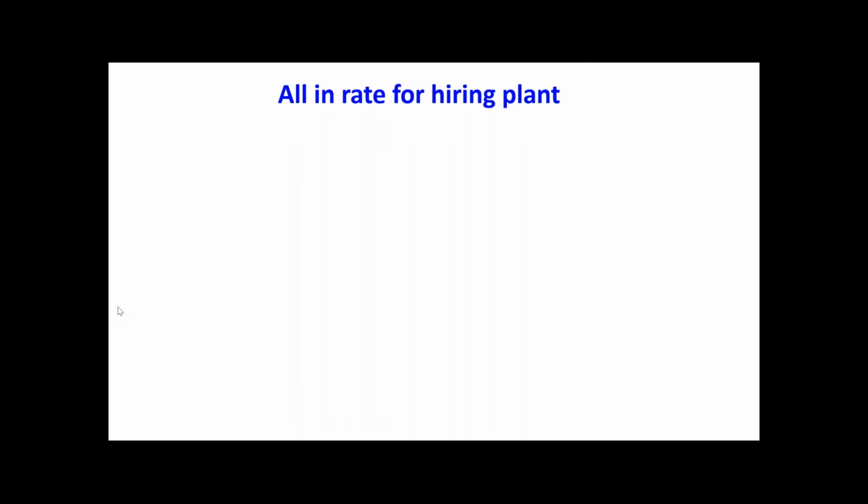Definitely, we have the main cost. What is that? When you are going for renting, that means hiring, what should be paid? Rental. Yes, very good. That is the first cost. If you are hiring generally a rental car, that should include the maintenance and the insurance, right? Because the car company itself has to take care of their asset, and also they have to provide the insurance, isn't it? In Gulf countries, that is mandatory.